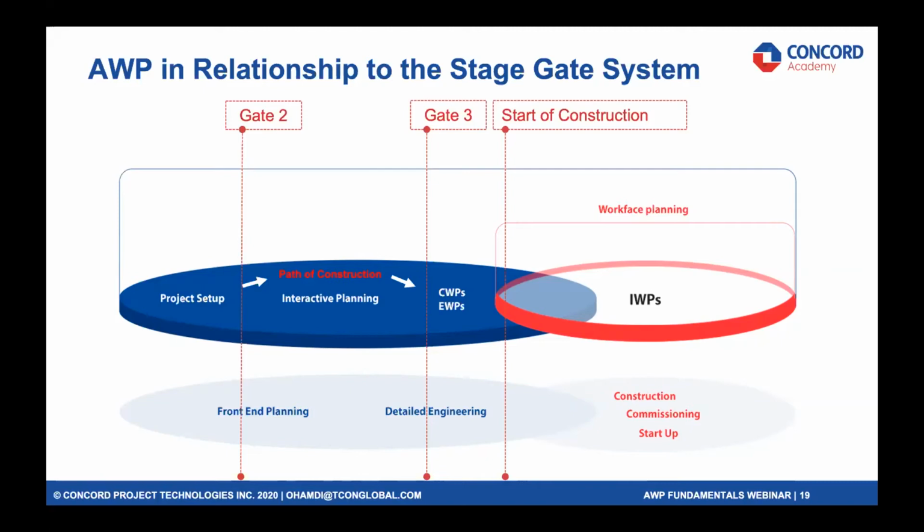As you can see here, when we get through gate 3, and that's generally where projects get authorized, it's called full funds authorization, or full investment decision. All companies have various terminologies for that. But by the time your project is authorized and you've finished your FEED package, that's basically when the award happens to the EPC contractor. That's when we start creating the engineering work packages and the construction work packages, and we start embarking into execution.